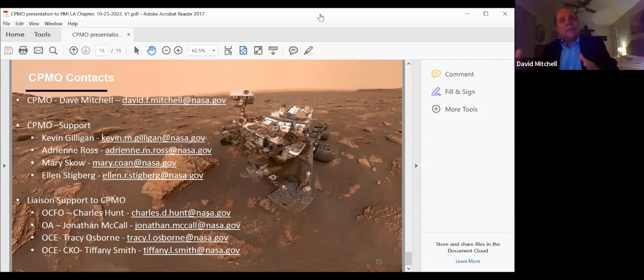And so you'd walk into that 1.5 day retreat with the facilitator having packaged 75 nuggets from these people. And we have a very meaningful discussion on how we need to be operating going forward. And from that, in the end, after we launched the project, launched the mission, we had over 300 lessons learned from the Maven project alone, and that I shared with other projects along the way as they were getting started. But I think we can do so much better than that.